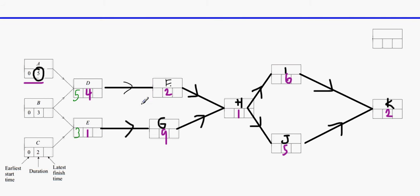For F, only D connects into it, so five plus four is nine. For G, only E connects into it, so three plus one is four. For H, both F and G connect: nine plus two is eleven, four plus nine is thirteen — thirteen is the biggest, so that goes there. Thirteen plus one is fourteen, so fourteen goes forward. Fourteen plus six is twenty, fourteen plus five is nineteen — twenty is the biggest.